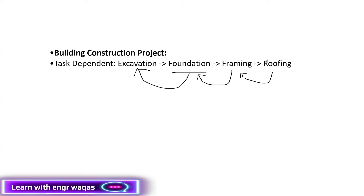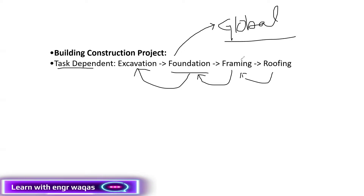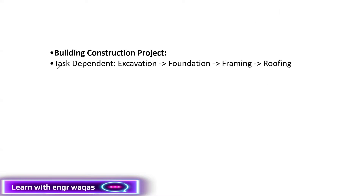The second important thing: these activities are going to follow a specific calendar, which would be called the global calendar. They are going to share that calendar. Framing, foundation, and excavation are all going to follow the same calendar. That is why we call such activities task dependent activities.